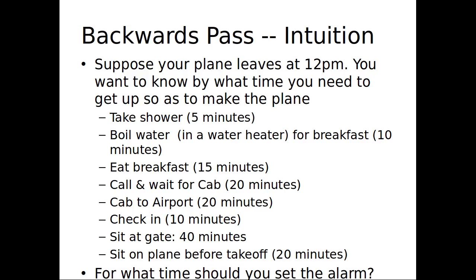And fundamentally, what one's doing in this case is deriving the late finish of an activity. You're subtracting off the duration to figure out when you have to start that activity. That's what we're doing, working back through there.